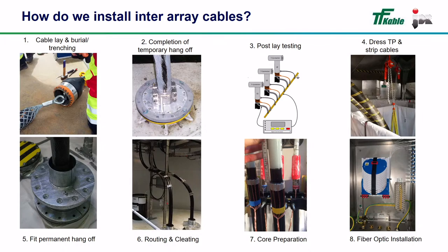We will have a plan, but we know as soon as we get out there, that plan won't stay. We have agreed rates of connection, but weather comes in, and if there are any issues picked up in terms of what's been presented to us with the TPs themselves, that can cause delays. It's a constantly evolving plan, and the teams offshore are agile in their reaction and problem solving, and in how they bring all the individual elements together to create a successful deployment.